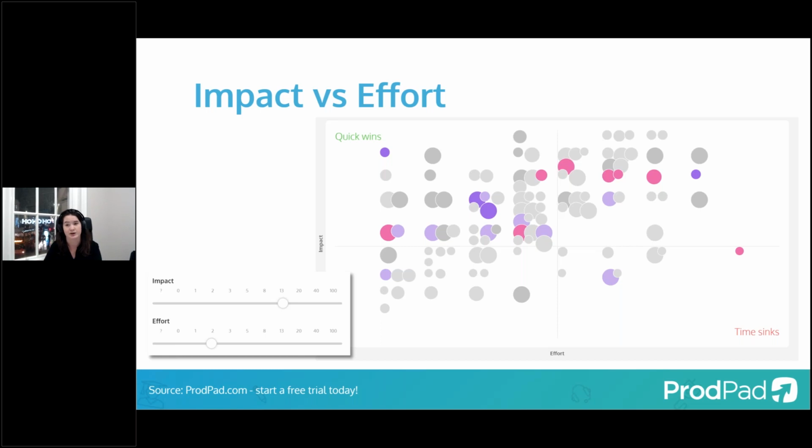If you're familiar with planning poker, this is using a similar scale to that. It's a Fibonacci scale based on the ratio of Fibonacci. And the whole idea is that the larger something is, the more guesstimation has to go into it, and it helps keep you away from trying to overestimate or get too detailed in your estimations too soon, and takes the pressure off. You go, okay, that's definitely something big, so that goes here, and that's something small, so we can break that down into a little more detail. We can understand that, and now we have just enough data to start measuring it. And so the key here is that it's not turned into any sort of fancy calculation.